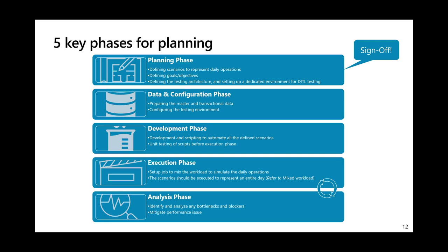And then you need to do the promotion again in the system. That means you need to repeat the execution phase again. And after the traffic integration completes, you need to analyze the testing result again. So you can see the execution phase and analyze phase should be in a cycle, and the cycle could be long. When you complete the analysis, you should have some findings and fixes in the system, and then you need to perform another iteration to come out with another testing result for analysis. So finally, yes, that should be the day in the live testing.